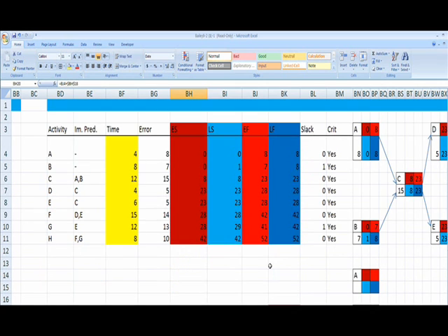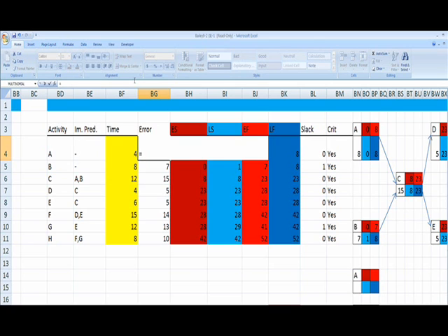Now this is all based on a time that I know for certain A is going to start, B is for certain going to start, H is for certain. However, that's not the case. You might not know. So what I'm going to do is simulate using random variables, or just a random function. I'll recalculate this: equals the average time, and I'm going to use NORM.INV, because I'm basically getting a value based on a percentage or probability, and my probability is what's random.